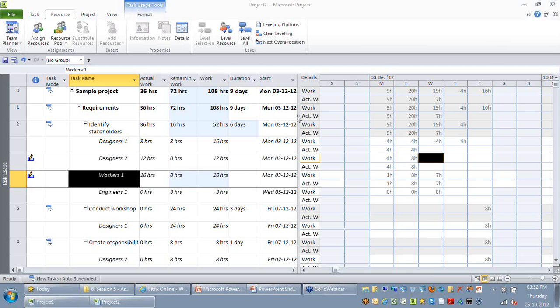About 55% of IT projects are schedule and cost overrun. How do you recommend to overcome this? I think it's very true. It's nothing to do with how they build a schedule. I think the most common challenge is estimation. One of the common challenges I find with IT projects is that we need to have a record of the estimates we have prepared for earlier projects. If you have done that, naturally those estimates can be reused so that we can learn from our experience and the same mistake does not happen.